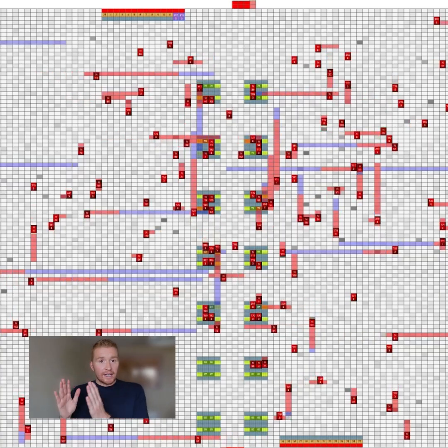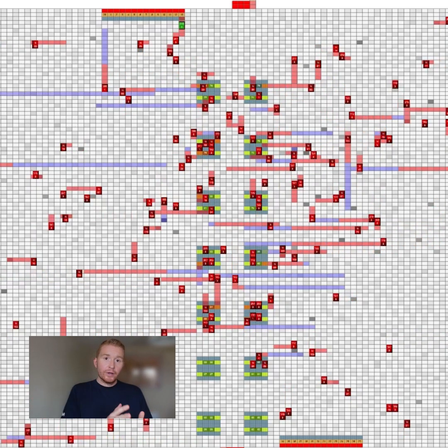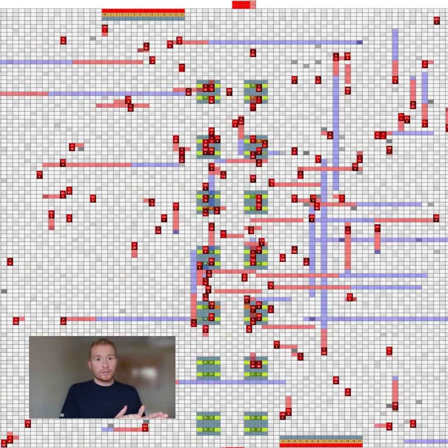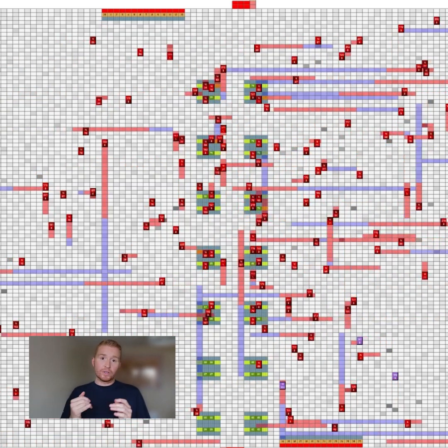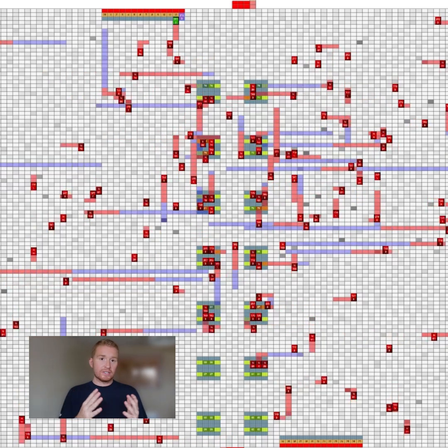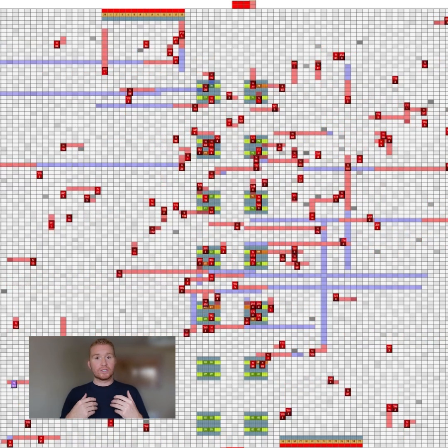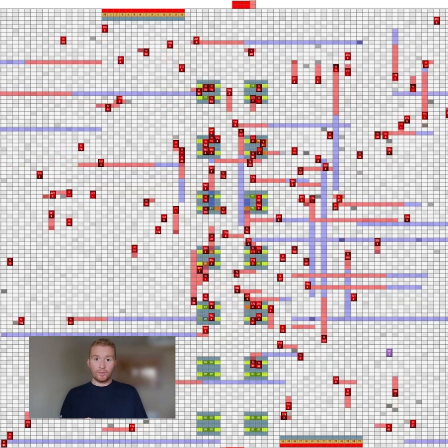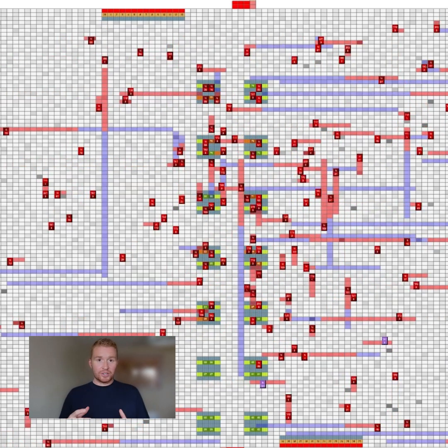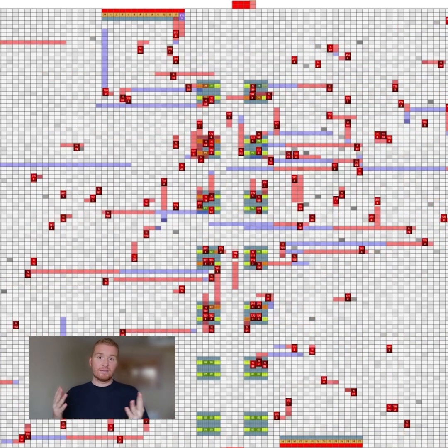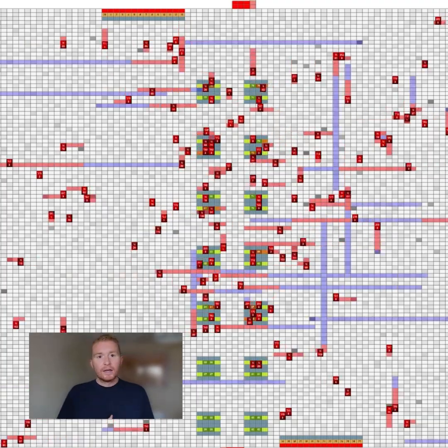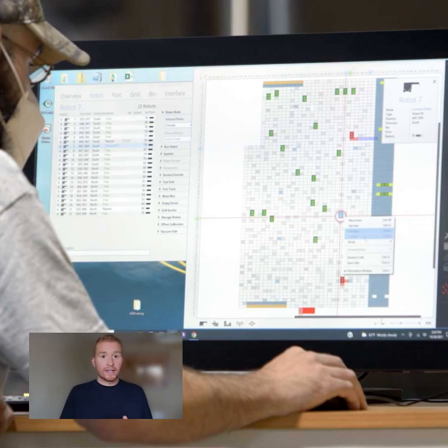So we will take that exact same simulation file, download it onto the physical grid that's just been installed, and make sure that the physical grid marries up with the simulation that we've run. So we'll use all of the same parameters, same robots, same bin positions and everything, and we will just deliver those bins and just keep those ports running without anyone picking anything out, just to prove that the system physically is working as we would expect, which 9 times out of 10 it absolutely does. That software is called SimLive, and that's a standard part of the commissioning process of any sort of AutoStore install.